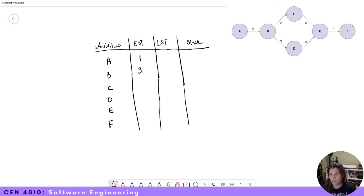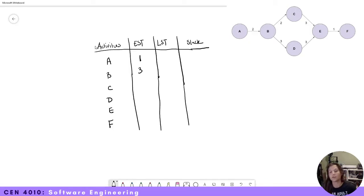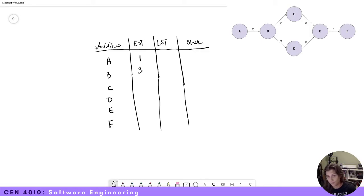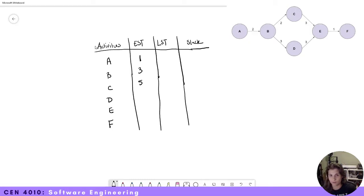Now let's look at C. The earliest start time for A was one, and the earliest start time for B is three. The duration between B and C is two, so the earliest start time for C is five. Now let's look at D. The earliest start time for D is six.